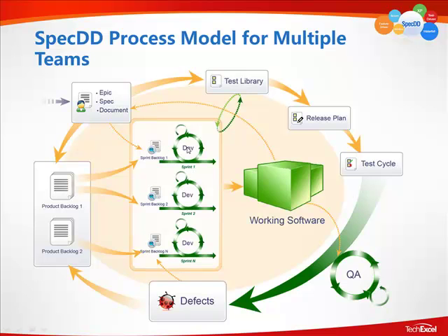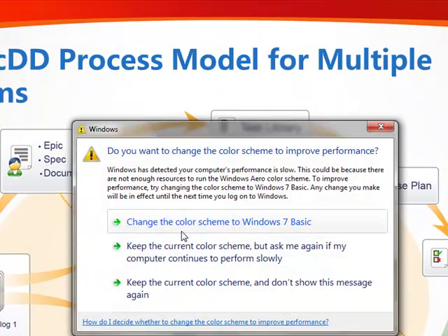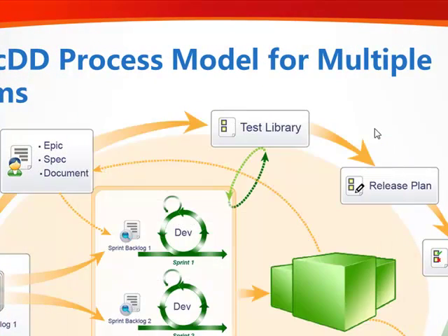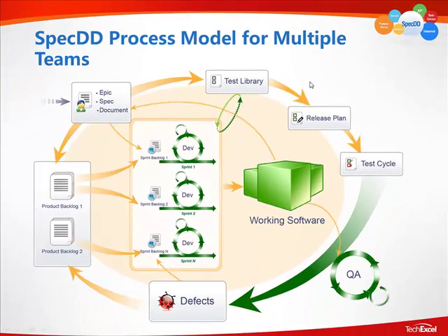Okay? Now, if your defects or your versioning of the working software has grown, is extremely complicated, I have seen scenarios where the product backlog 1 is simply new features, and the product backlog 2 is only defects. However, if you're smaller, there's really no reason to do it this way because the prioritization of two product backlogs, simply distinguished by new features and defects, is no different than the prioritization of one backlog, distinguished by new features and defects.